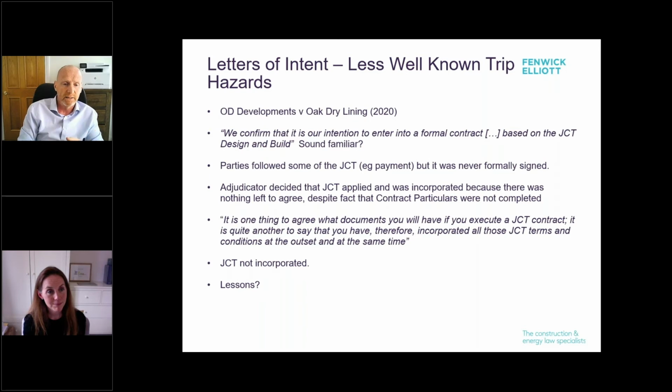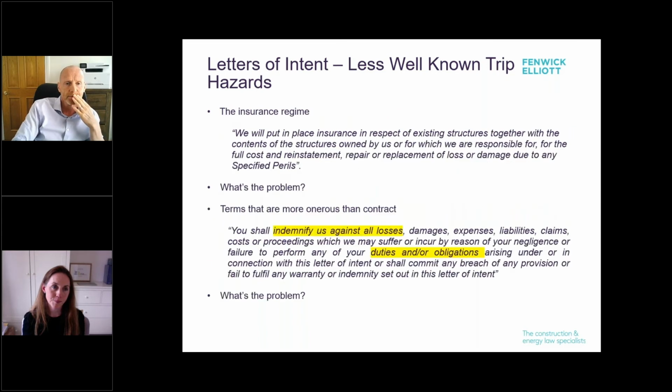So I think the lesson learned there, and again, it's as Lucinda touched on, very, very fact specific, but it can be the toss of a coin as to whether that building contract is incorporated into that letter of intent. So the lesson learned there is to think very carefully when you're skimming down that letter of intent and it talks about an intention or incorporation of a building contract, never assume that that is watertight, okay?